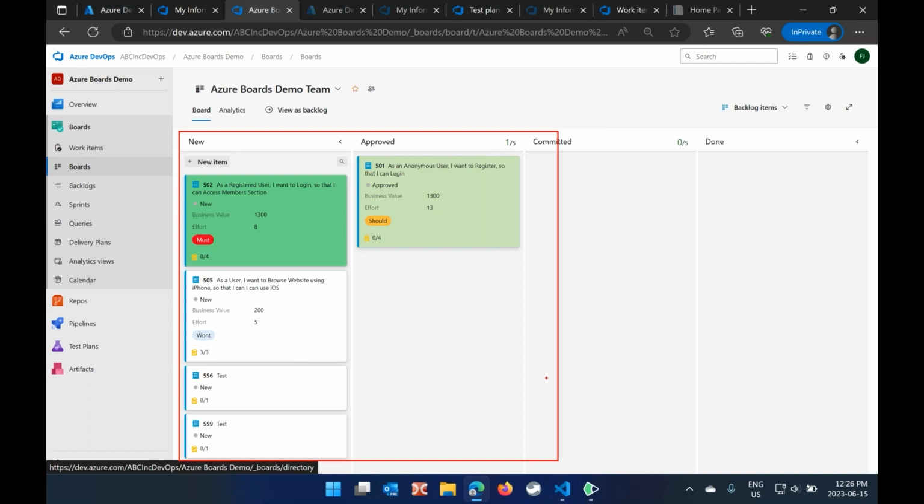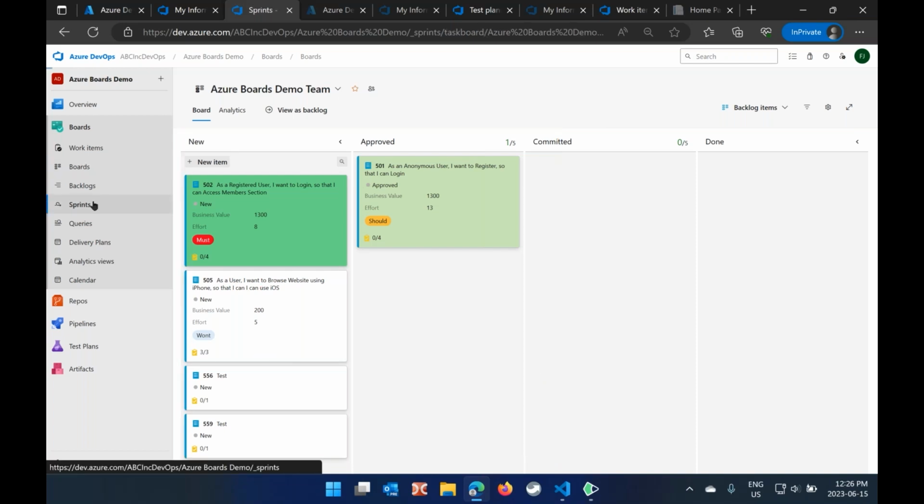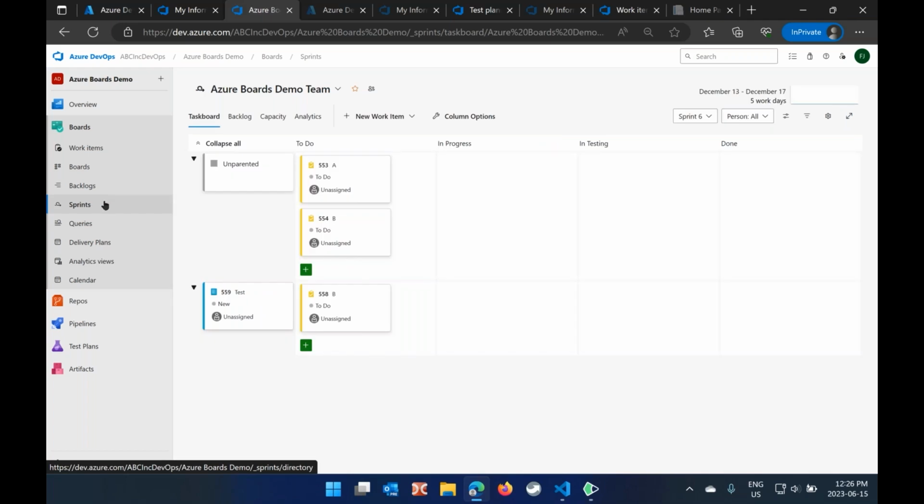So what can you work on in the next month? What can you show as a demo at the end of the month? That is known as a sprint. The sprint is the iteration concept. The iteration means that, let's say, the development team will commit to a one-month-long cycle. So at the end of each month, we are committing that, yes, we will show some demo to the end user and we'll get the feedback.